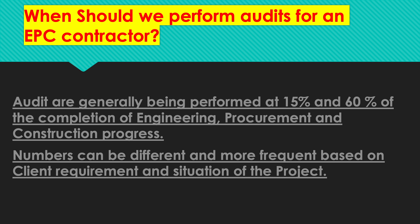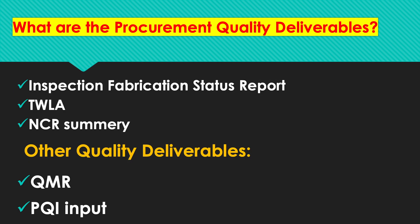What are the procurement quality deliverables? The regular deliverables are: inspection fabrication status report from all vendors together in a log, a two-weeks look-ahead for all vendor activities ongoing, and the NCR summary. Other quality deliverables can be a quality management report and input for the project quality index.